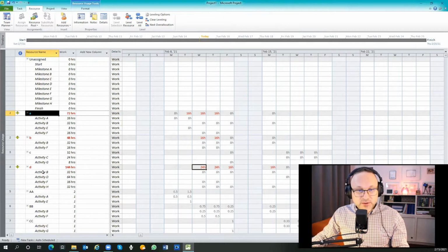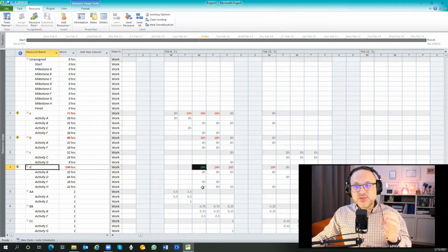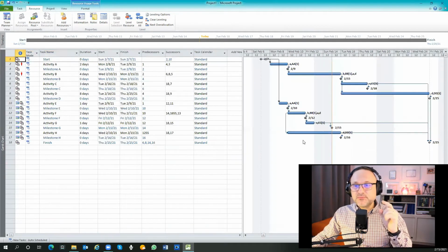While here, resource D already has 24 hours. This person works 24 hours a day. This is not realistic, so you have to do something. That means this project is not real.